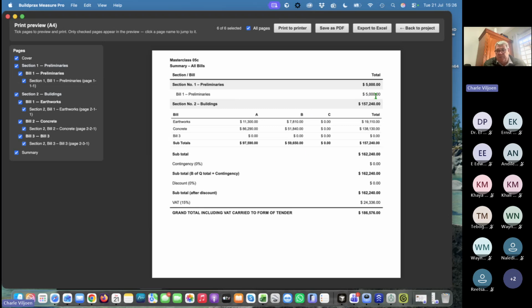So you've got your preliminaries, and in your summary you can see A, B, or C, and it totals up to that. And you've got your contingencies if you wanted to do that, and or discounts, and you've got your VAT on there.